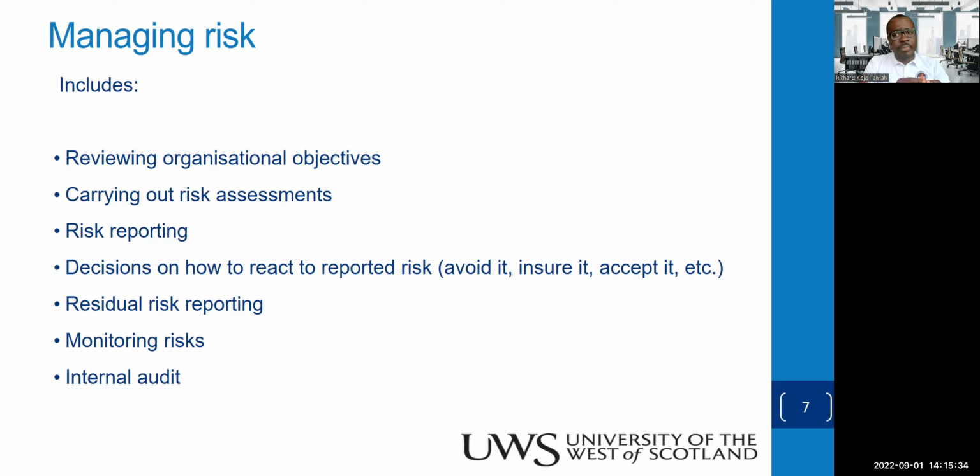Manage it, record them. Because, you know, a lower risk today could jump up to become a significant risk in future. So that's why it's important that even if the risk is insignificant, report it, record it in the risk register, okay? And decide, how do we deal with this reported risk? Should we avoid, transfer, accept, tolerate? What should we do, okay? Use a TARA model. And then, of course, listen to this. No organization can eliminate all its risk. There will always be what we call residual risk.